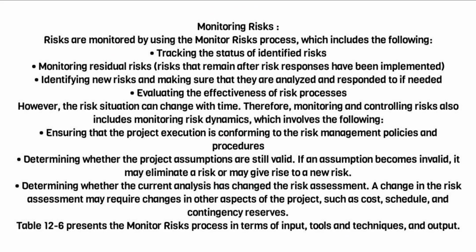Monitoring risks. Risks are monitored by using the monitor risks process, which includes the following: tracking the status of identified risks, monitoring residual risks, risks that remain after risk responses have been implemented, identifying new risks and making sure that they are analyzed and responded to if needed, and evaluating the effectiveness of risk processes.